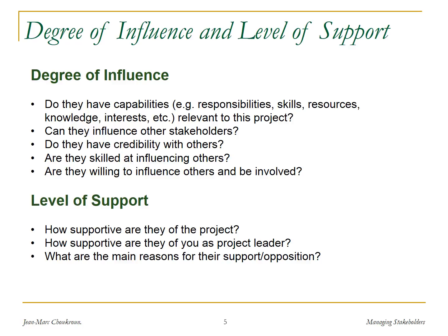Then we want to know if they can influence other stakeholders, if they have credibility with others, if they are skilled at influencing others, if they are willing to influence others. You can see here that some of the material we covered in the influence discussion last week is relevant here. And then the second dimension is the level of support. How supportive are they of the project? How supportive are they of you as a project leader? And what are the main reasons for their support and opposition?